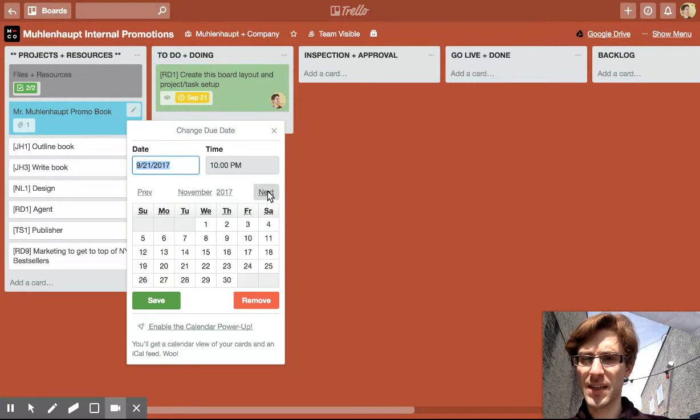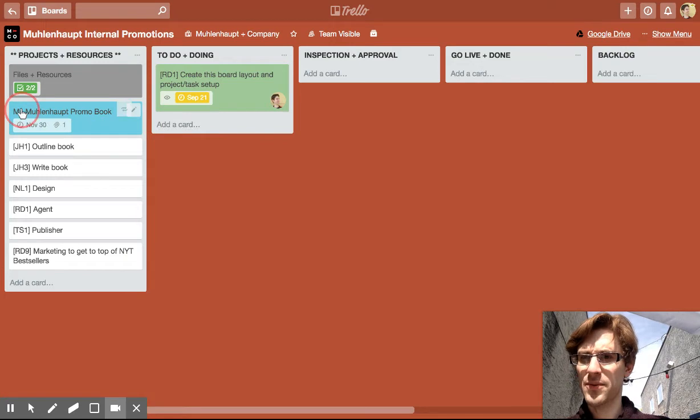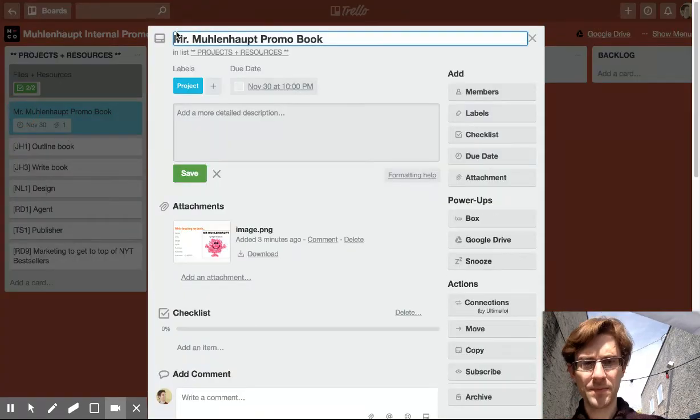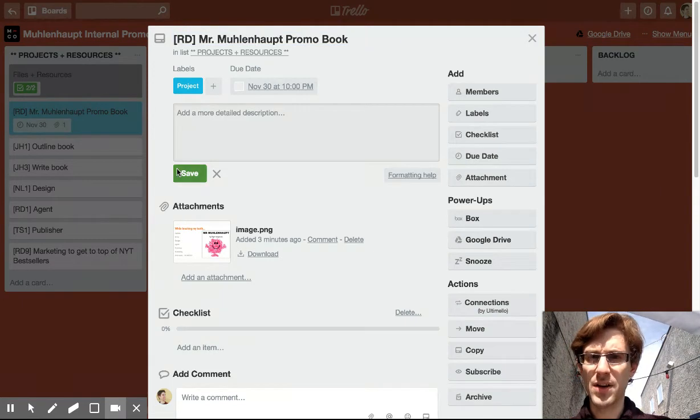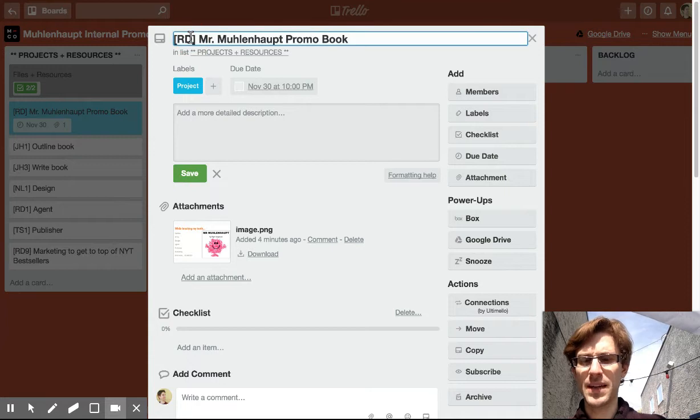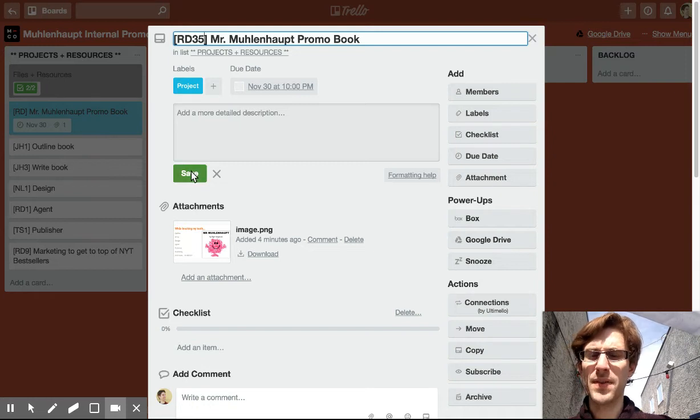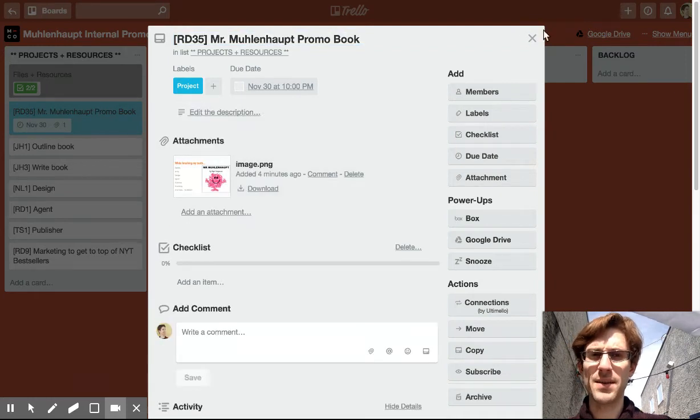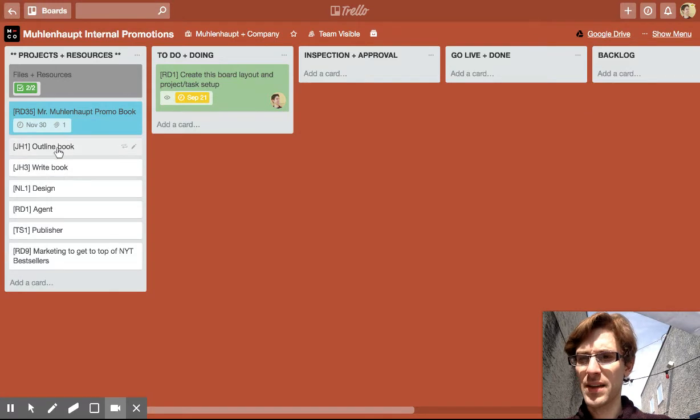The due date for the project as a whole, we're going to put as November 30th. I don't need that done right away, and I forgot to add myself as the project owner. So I don't know the number of total hours involved in this project yet, but I do know that our maximum cap that we provided to Adam was 35 hours. So we need to get it done within that somehow. Hopefully come in a little bit less.